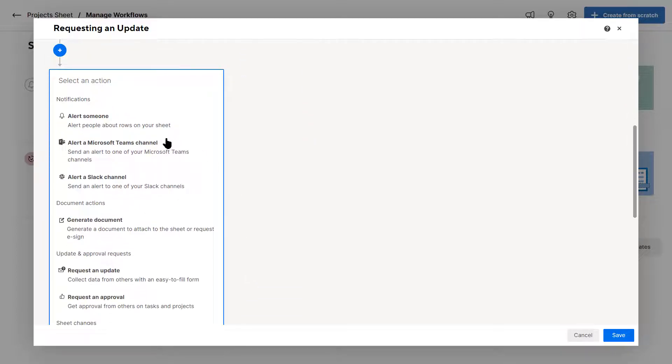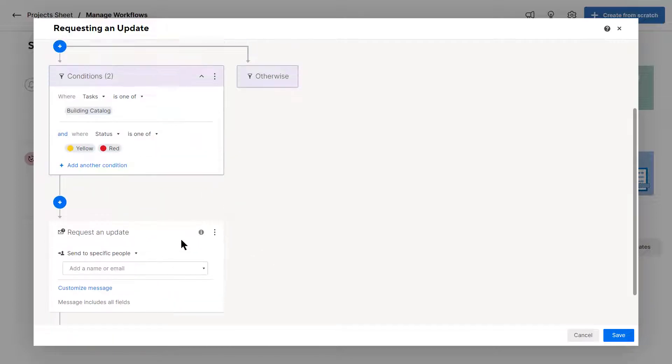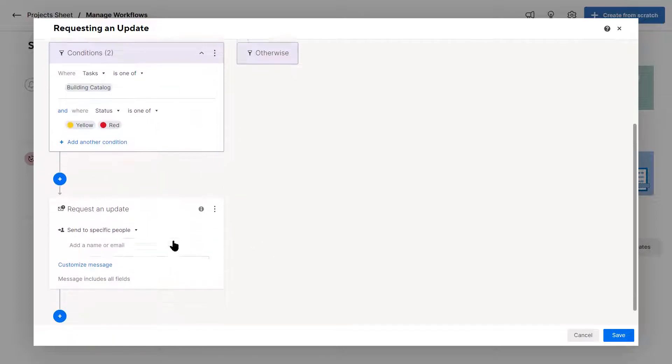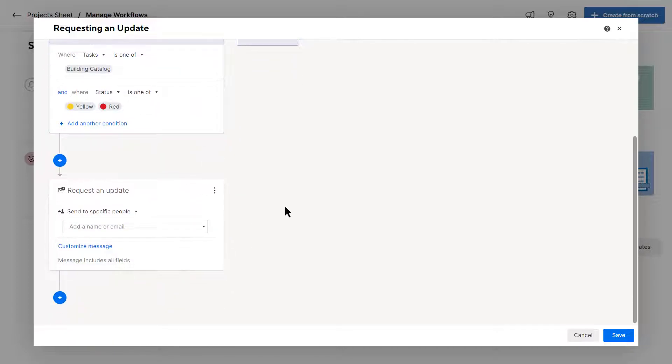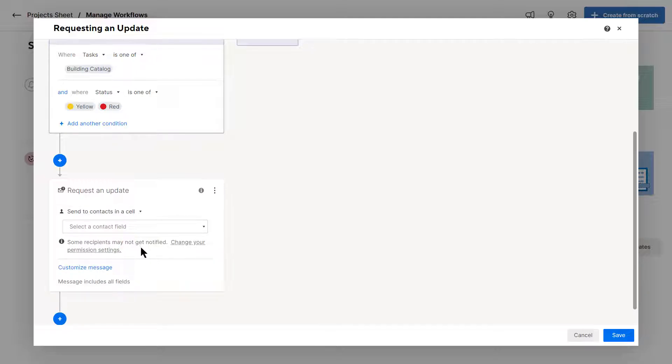Now, you can alert someone or you can generate a document, but sometimes you won't get that yes or no. So I want to request an update. So I'm going to click on request an update. When I do this, it'll ask me to send to specific people or any of the contacts in the cell.